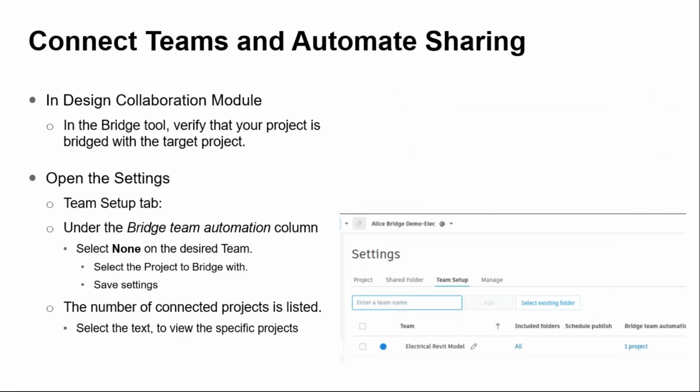Now, when the team shares a package, a copy of the content will be automatically shared with the corresponding team shared folder. This allows teams to leverage across the bridged projects the same way they would if they were sharing internally.